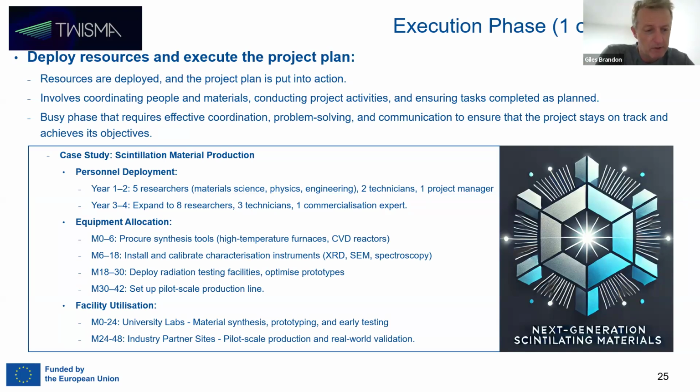You can't expect to arrive at month 24 and only at that point start asking about the availability of these industrial partner sites. Almost certainly these industrial partners will need, I would imagine, at least a 6 months heads up beforehand to make sure that their facilities are available, and quite possibly even more than 6 months, maybe the best part of a year in advance.